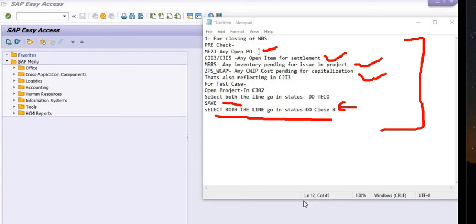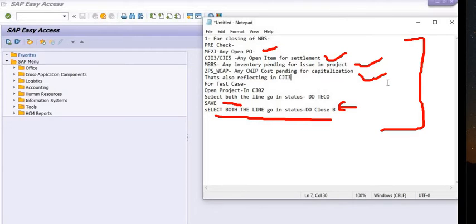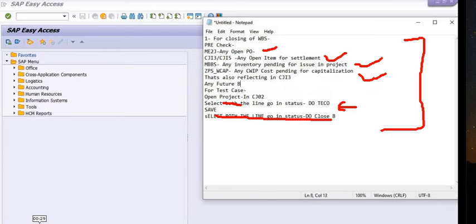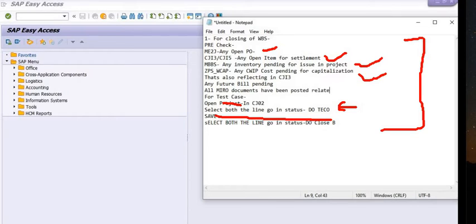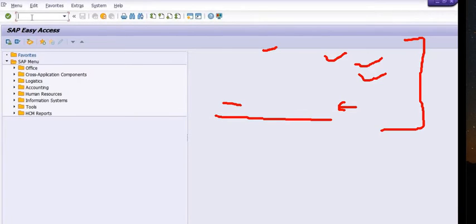You can also extract this report in CN41. You need to ensure that all MIRO documents have been posted — for example, first running account bill, second running account bill, third running account bill, at different project milestone activities. The project in charge shall ensure that all running bills have been properly processed in the project.